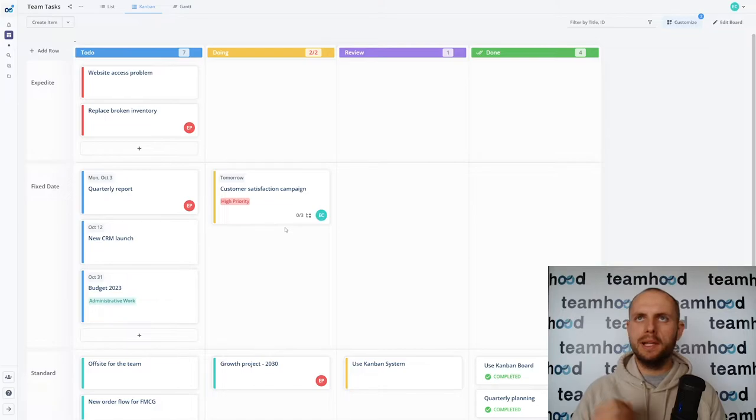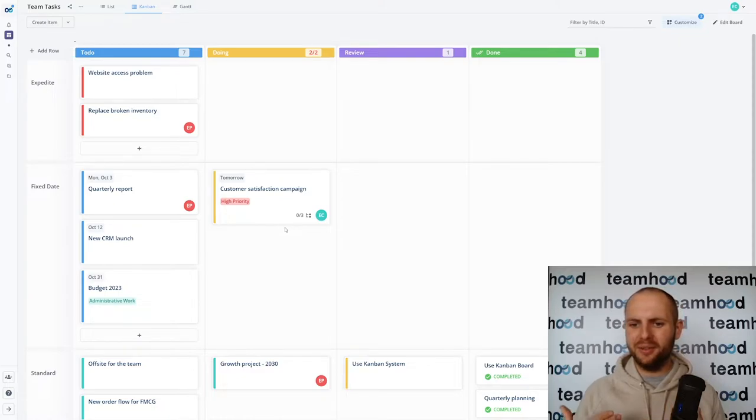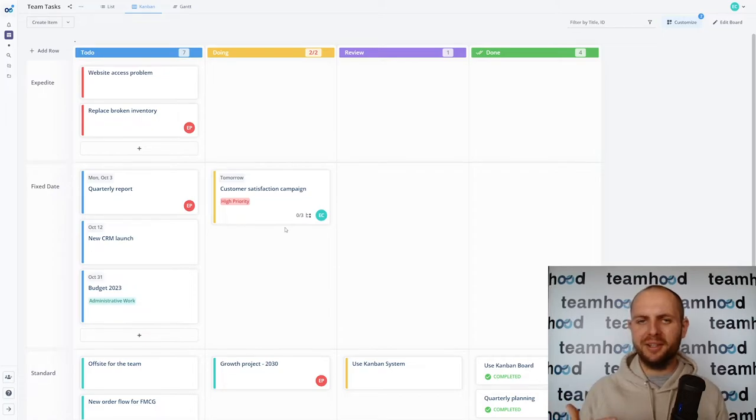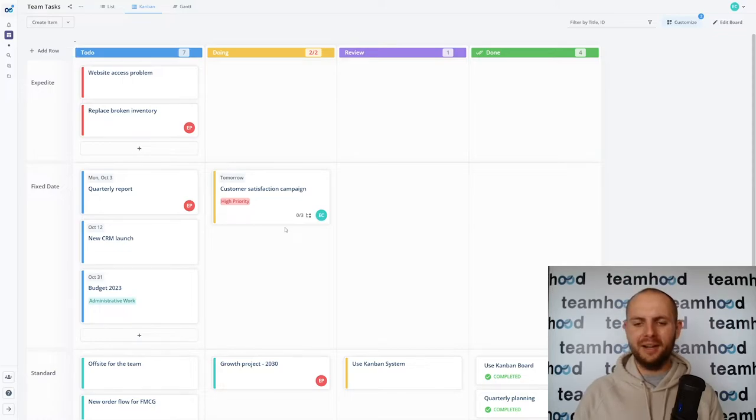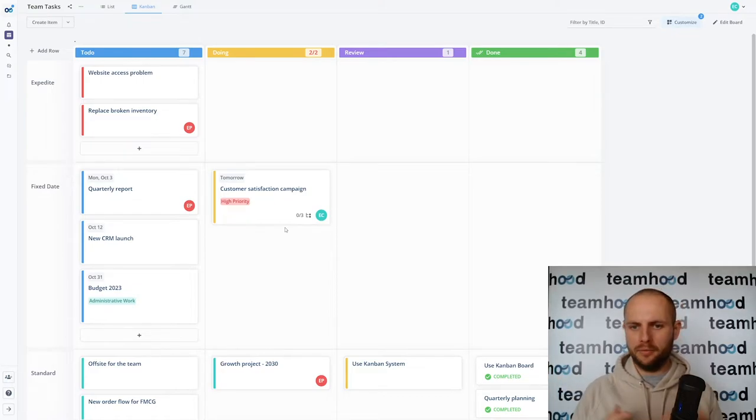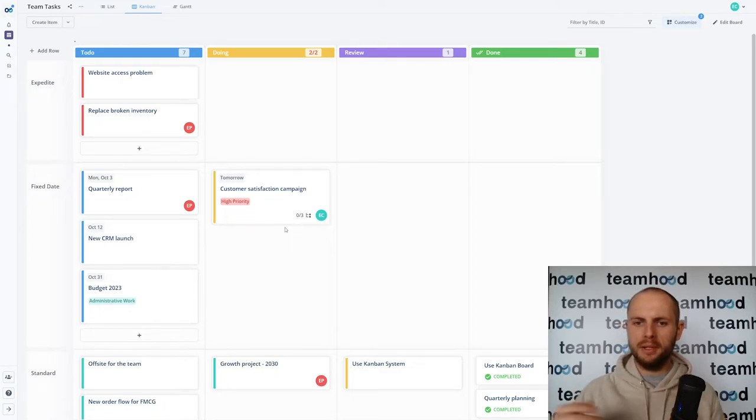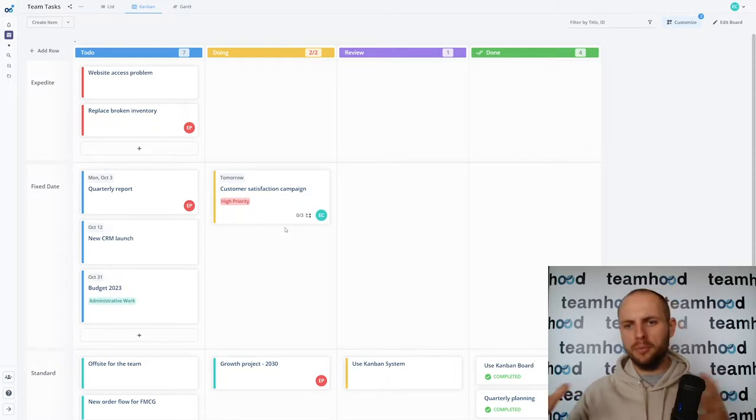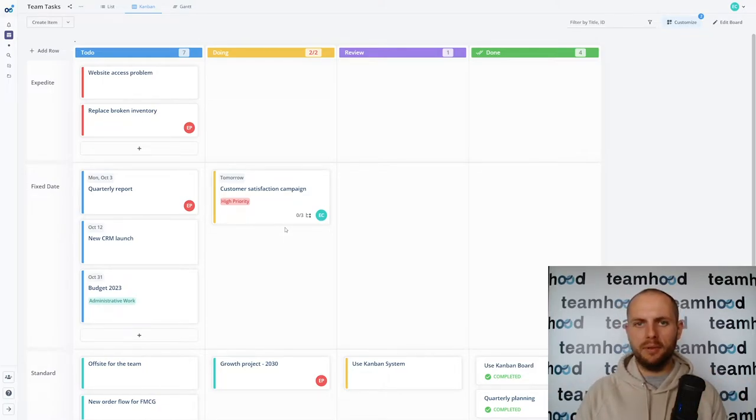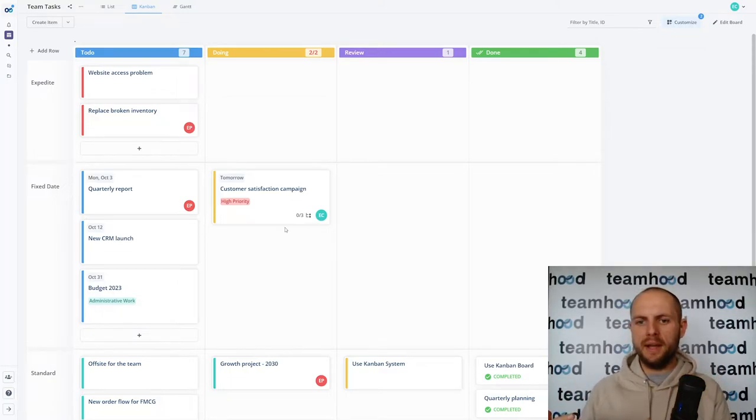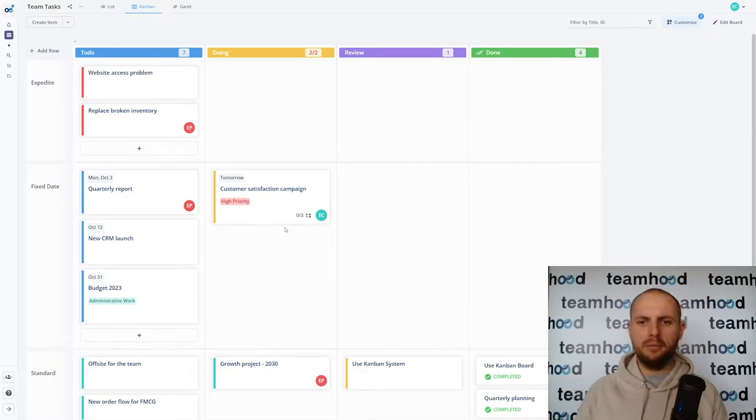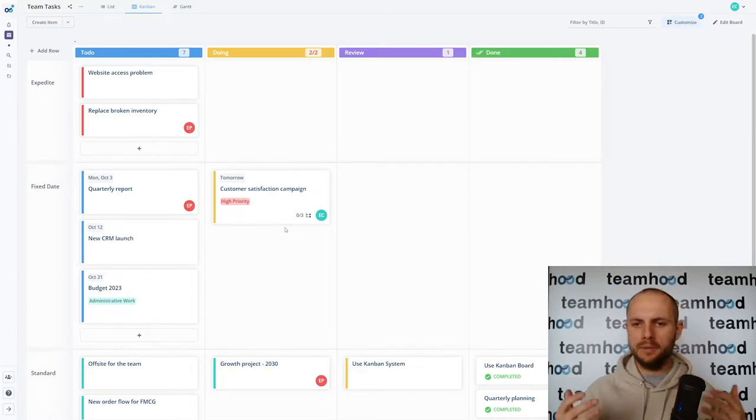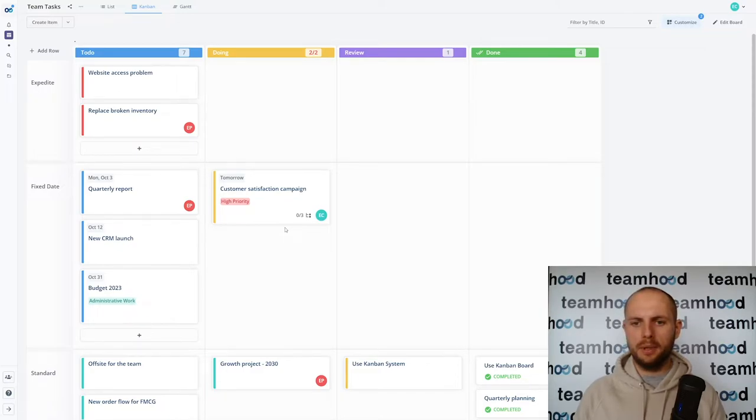With work in progress limits you might start feeling a bit of pain when you want to switch tasks or you need to move something in additionally and there's already a thing that you're working on and it's unfinished. Well either you define the process differently and you have further steps which bring value, which bring your card closer to the finish line of course valuable steps, or you implement queuing mechanisms or you implement commitment points and don't allow moving things back. Because moving things back from work in progress to planning is actually painful. It's a waste. It means you started doing something, you didn't reach the value and you move it back to planning where it will take time from somebody else who needs to prioritize it again, figure out what's missing and move it back. So that's the idea. If you can solve something on the go like impediments, blockers, you should do them. If you cannot then you need to define the process how to act on such occasions.